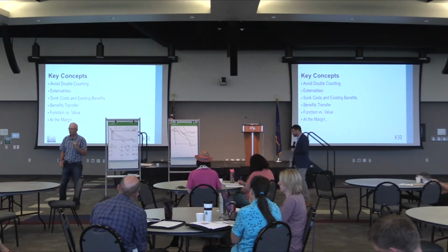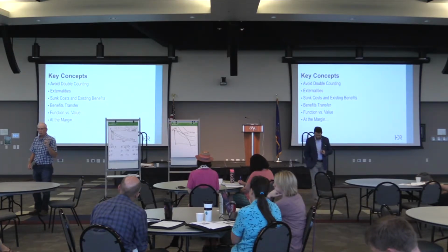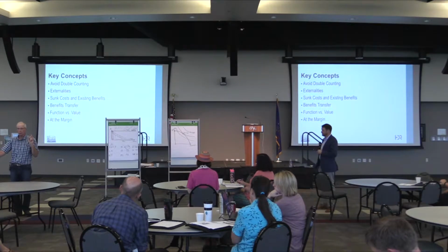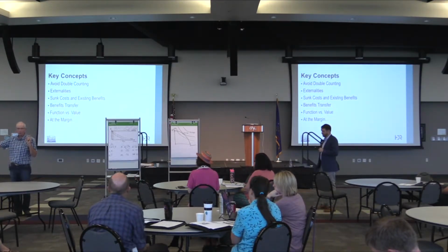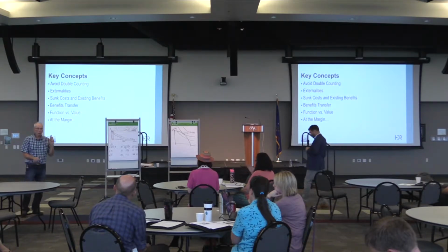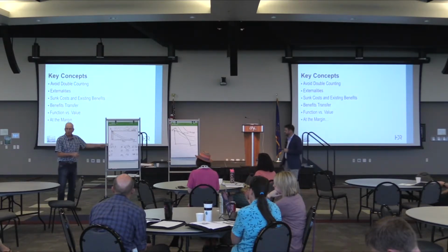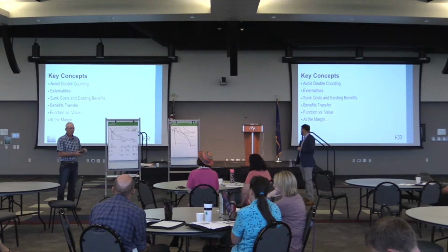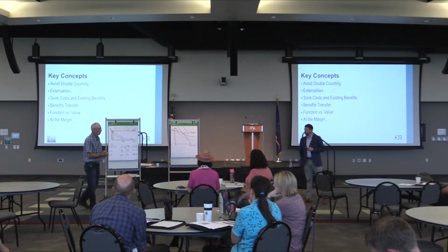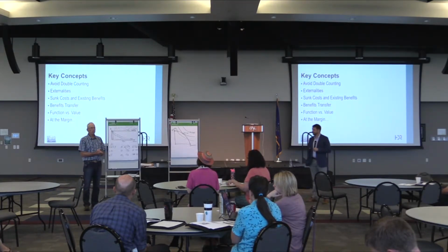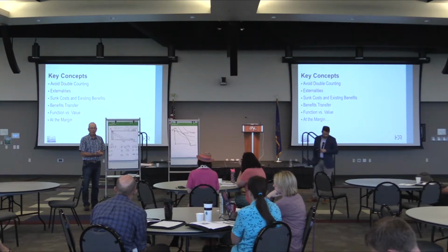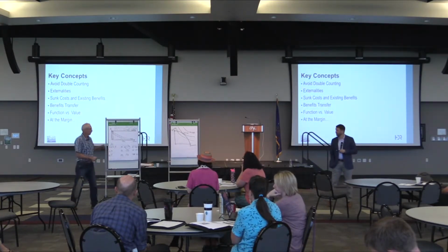Would it be appropriate, if we didn't know what open space was worth in Williams County, to use open space value from Orange County, California? Not at all. Pat's sharp eyes will catch that. You want to use open space value from Roberts County, South Dakota, or something similar. Benefits transfer is making reasonable transfers of benefits from another area to the area that you don't know.